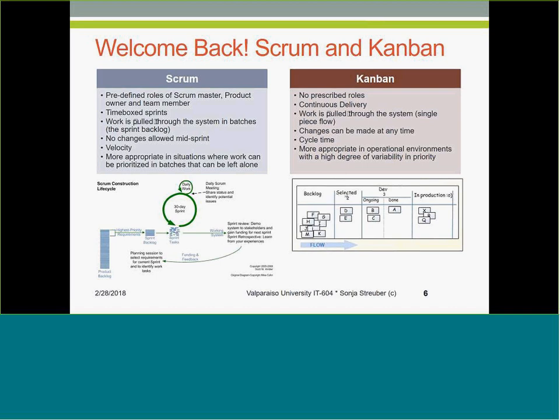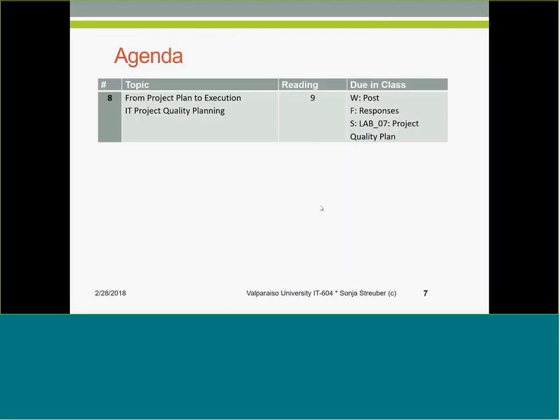And it is regulated in these work in progress limits in order not to cause any bottlenecks or any stoppages. And if we have a situation like this here, where we can't finish something in development, then folks who are waiting here, or folks who are waiting here and have nothing to do, will run into development and will help get anything done that needs to be done at this point in order to make sure that the flow stays continuous.